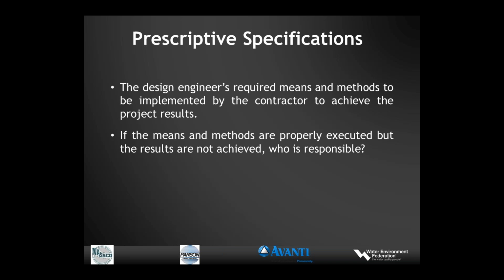So if the means and methods are properly executed, but the results are not achieved, who is responsible? Well, there is case law available to review that indicates the design engineer can be responsible in those situations.